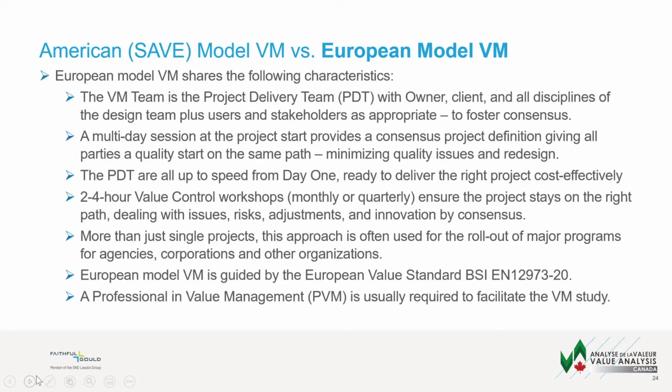And with the owner, client, and all disciplines of the design team, plus the users and stakeholders as appropriate. And the point of it is to foster consensus on the design. A multi-day session at the project start provides a consensus project definition, giving all parties a quality start on the same path. And if everyone starts on the same path, you're going to minimize quality issues and redesign down the road.